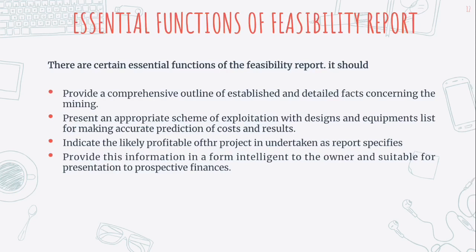Essential functions of the feasibility report. There are certain essential functions of a feasibility report. It should provide a comprehensive outline of established and dated facts concerning the mining, present an appropriate scheme of exploitation with design and equipment list for making accurate predictions of costs and results, indicate the likely profitability of the project undertaking as reported if specific, and lastly, provide this information in a form intelligible to the owner and suitable for presentation to prospective financiers.